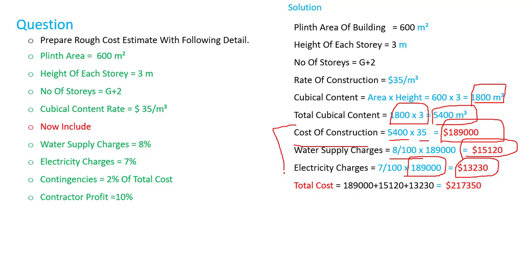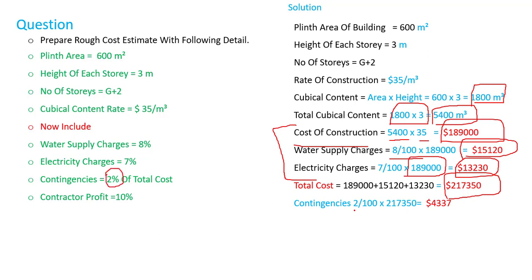The total cost equals the cost of construction plus water supply charges plus electricity charges, coming to $216,735. Now we add contingencies at 2%: 2 divided by 100 multiplied by the total cost, giving us $4,347.